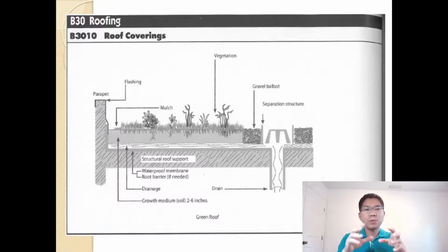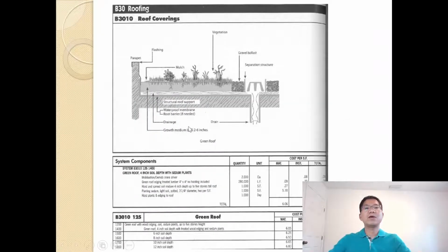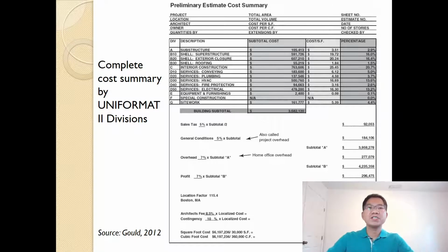So this kind of estimate is easy for everyone to develop and gives an idea during the development stage of the design to see which type of system, which type of design, will meet the budget from the developer, from the owner point of view. And here, going further, as you can see, it breaks down to the cost for each system. So it's very convenient. And continue further for each system. For example, the roofing, we can get the money, and for other services, we do the same.